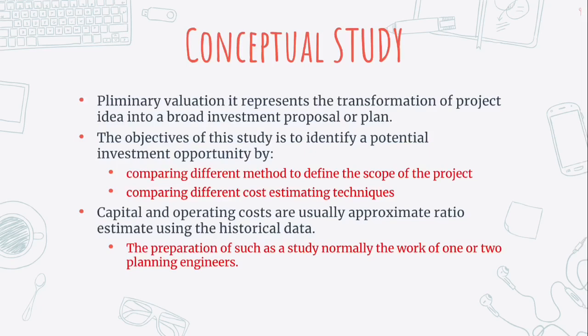Conceptual study includes preliminary evaluations. It represents the transformation of a project idea into a broad investment proposal or plan. The objective of this study is to identify a potential investment opportunity by comparing different methods to define the scope of the project, and comparing different cost estimating techniques. The capital and operating costs are usually approximate ratio estimates using historical data. The preparation of such a study is normally the work of one or two planning engineers.